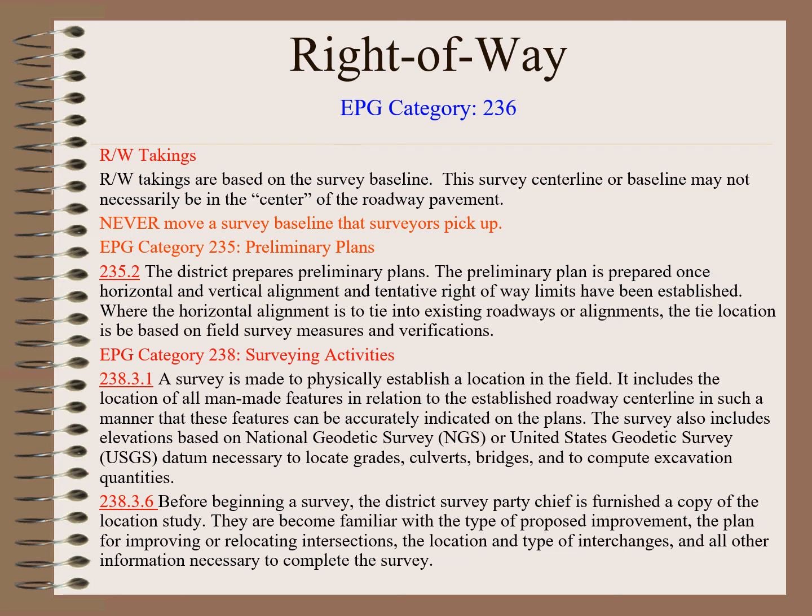As you can see, the right-of-way taking is directly tied to the actual survey, so it's very important that you keep the surveyor in the loop, that you include him in your core team, and that they are part of your team from the very beginning. That way we don't have any issues later on when we're trying to negotiate right-of-way and the right-of-way is not like it reads on the deed or some other legal document that was prepared by a surveyor originally. So it's important that you understand how that works.